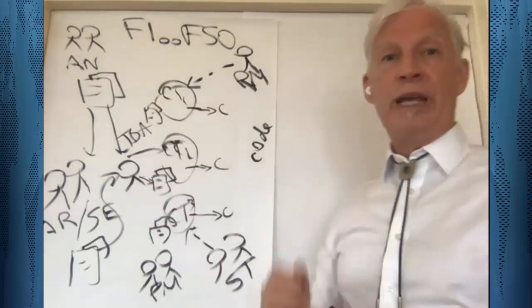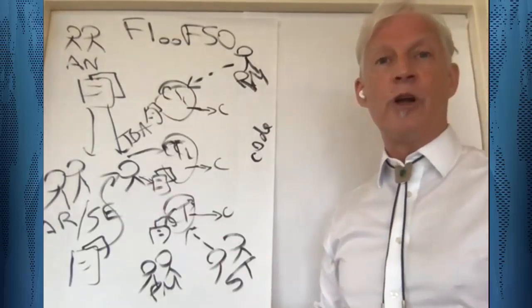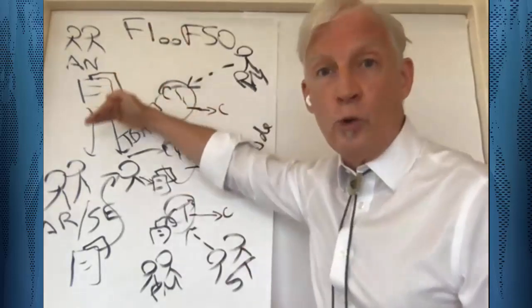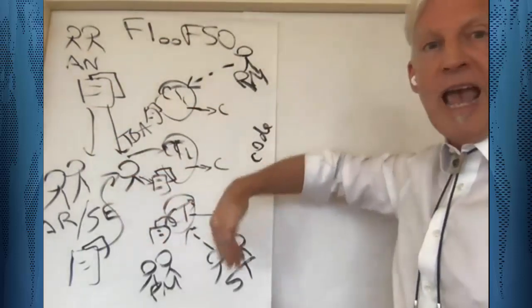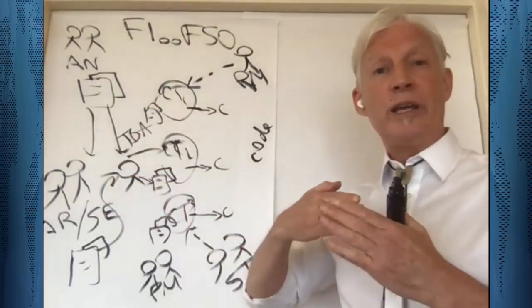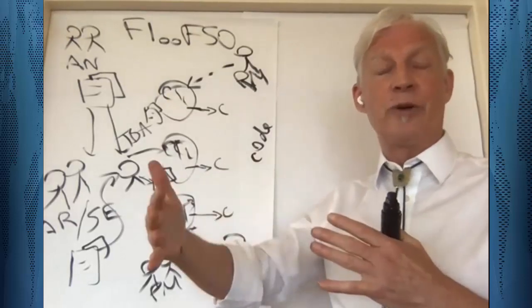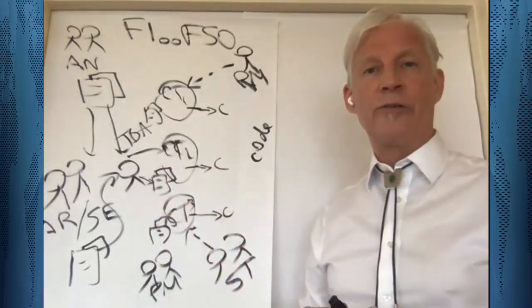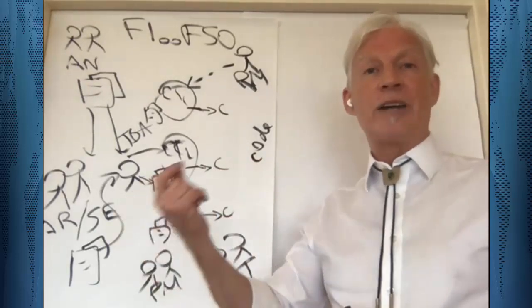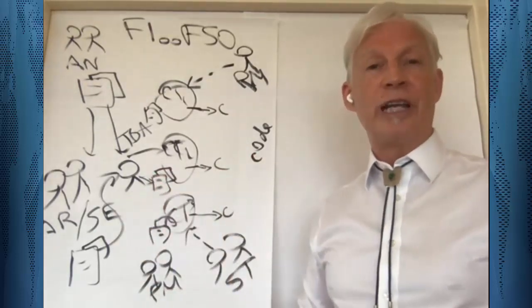Another point that I want to make is that if you're familiar with the terminology of what are called sequential life cycles, this is a sequential life cycle. And if you didn't know this, if you have component teams, it must beget or give birth to sequential life cycles.